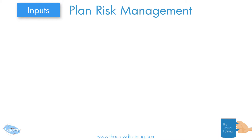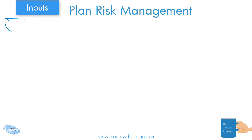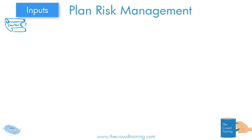We have to plan how we're going to manage the risks of the project, so we have to know essentially what the project goal and objective is. I'm going to draw the charter here — this is our project charter, which is telling us everything we need to do and why, and at least giving us the indication of what the project is meant to do and why. So our project charter is one input.